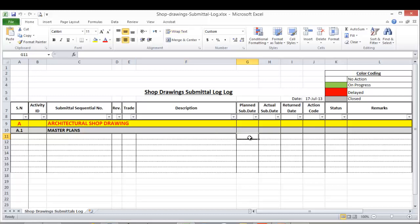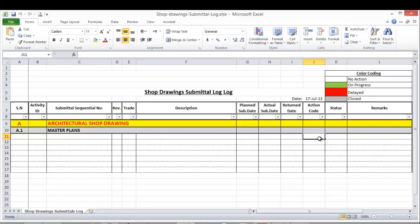Then we have the planned submission date and the actual submission date. When it's returned back from the consultant, the date of return and the action code. There are some action codes: A means approved without comment, C is revised and resubmit, and D is rejected. Then we have status - we put here open or closed, and if you have any remarks.